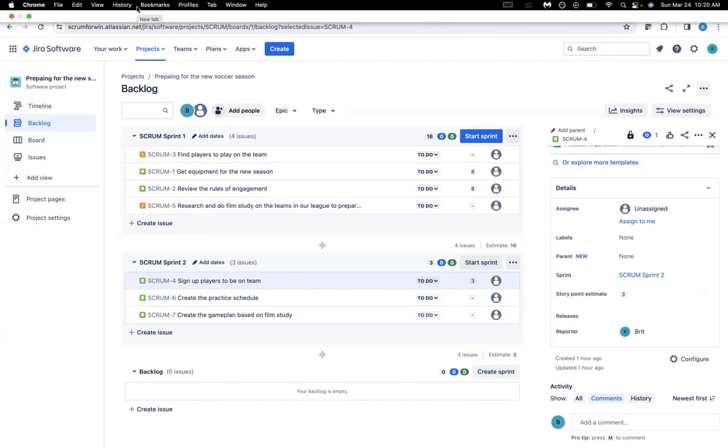Just doing quick math, 40 plus 45 plus 50 divided by 3, your team's velocity will be 45 points, approximately. So like I said, just understanding your story, understanding what your team is doing, that'll really drive the point home of, okay, this is how we're using empiricism to come up with future stats.